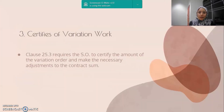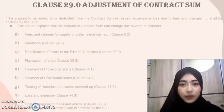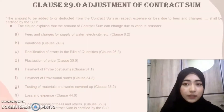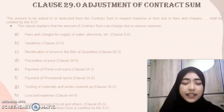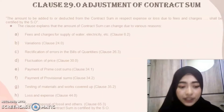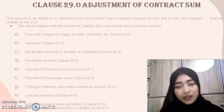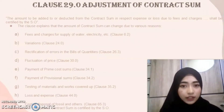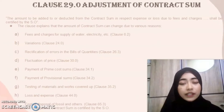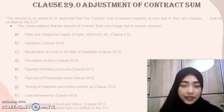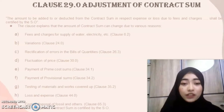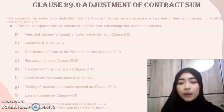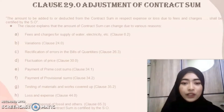Lastly, certifying of variation work. Clause 25.3 requires the SO to certify the amount of the variation order and make the necessary adjustments to the contract sum. Next is Clause 29.0, the adjustment of the contract sum. This clause explains that the contract sum certified by the SO will change due to various reasons, such as fees and charges for supply of water, variations, rectification of errors in the bills of quantities, fluctuation of price, payment of prime cost sums, payment of provisional sums, testing of materials, loss and expense, and cost of disposal.